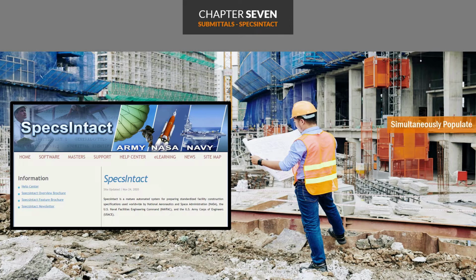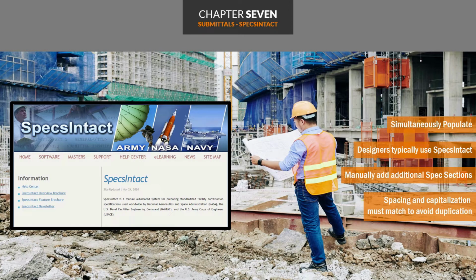If your contract is design, build, and your designer used Specs Intact to develop the specifications for your contract, when the Submittal Register is imported, this table will populate. Even if you have more spec sections that aren't in the import file of Specs Intact, you can still manually add them. But be careful, make sure you are entering exact matches.